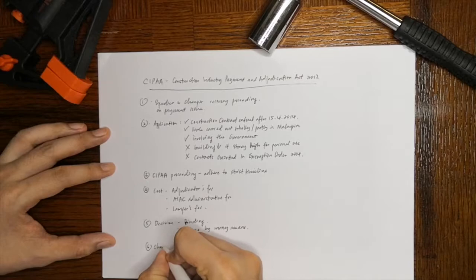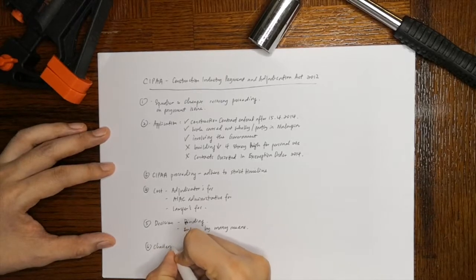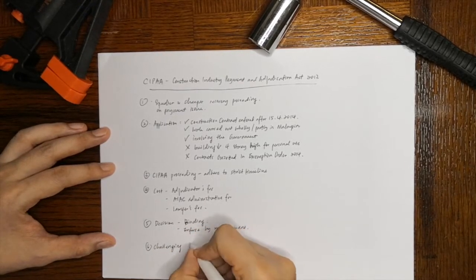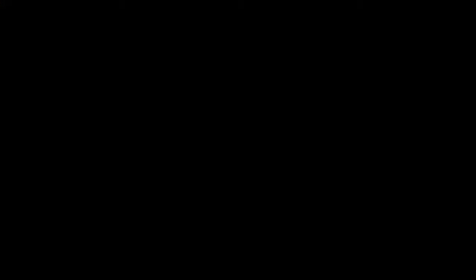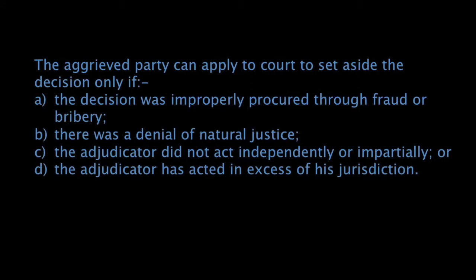The aggrieved party can apply to court to set aside the decision only if the decision was improperly procured through fraud or bribery, there was a denial of natural justice, the adjudicator did not act independently or impartially, or the adjudicator has acted in excess of his jurisdiction.